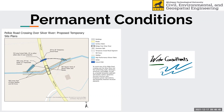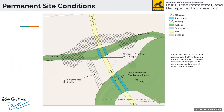Lastly, we'll talk about our permanent site conditions — everything after cleanup and bridge reconstruction. This is our permanent condition site plan. The areas in blue are where we impact protected wetlands, so we have to account for that after construction with some mitigation. The crosshatch pattern to the left is set aside for mitigation. The crosshatch pattern to the north, where the channel and culvert were, we do have to reseed everything that was disturbed. It's worth mentioning that most of this is outside the 60-foot right-of-way, so we do have to acquire an easement for a lot of this work.